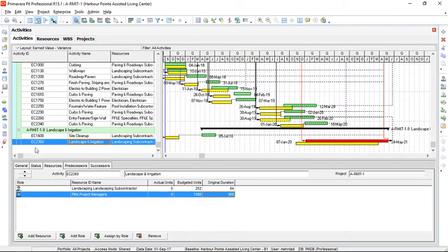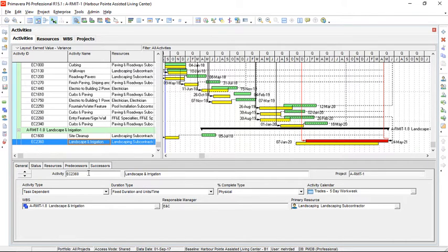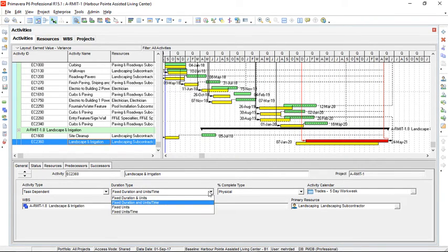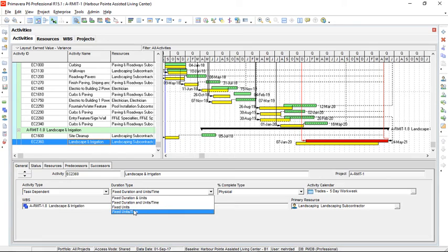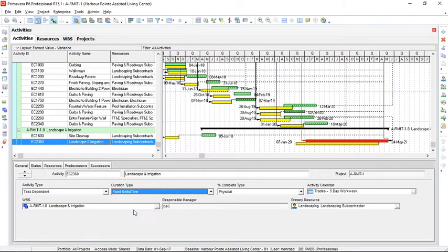So the first thing that we should do in the activities tab, it's very important to change the duration type of this activity to fixed units per time. By default, Primavera selects fixed duration and units per time for each newly created activity. But in crashing phase, we need to change it. So fixed units per time is selected.